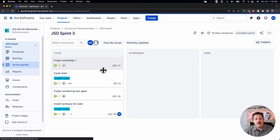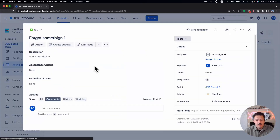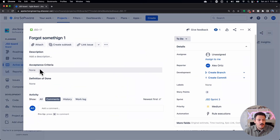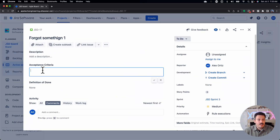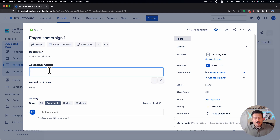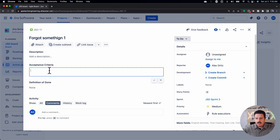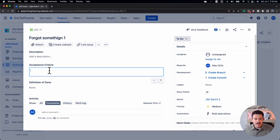Now when you go back into your project and open up a story, you're going to see that you have an acceptance criteria field here. As a product owner, you want to make sure you're going into every story — epics, tasks, whatever your process requires — but at a bare minimum at your story level, you want to make sure you're defining these acceptance criteria.